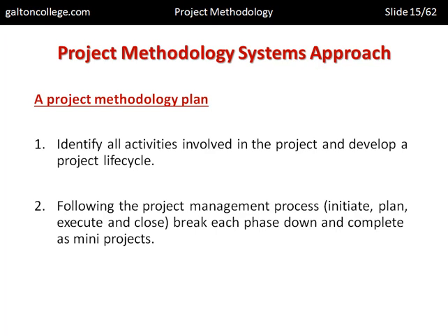Following the project management process, that's to initiate the project, to plan, to execute and to close, the ones we just mentioned in the previous slide. Break each phase down and complete as mini projects. Try to see these as mini projects in themselves. The initiation stage, the starting up stage, see it as a project. And the outcome of that project will be the initiation of the larger project. So these can be seen as, if you like, sub-projects. The main project is broken down under these headings, and these may be seen as sub-projects.